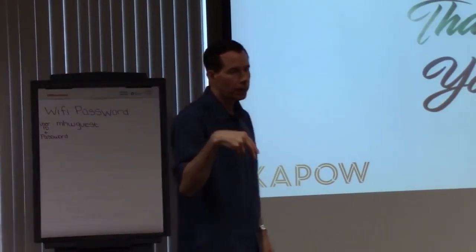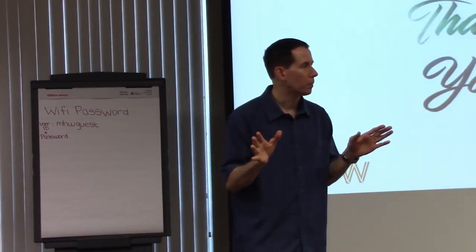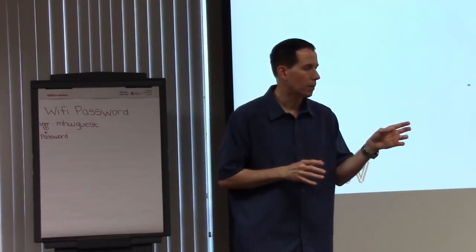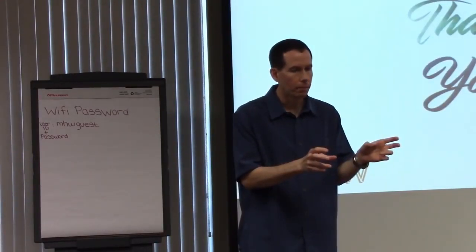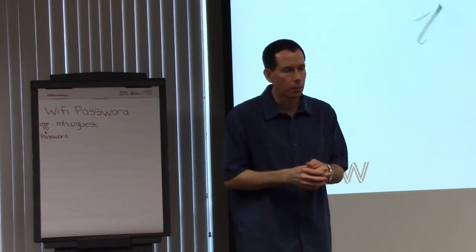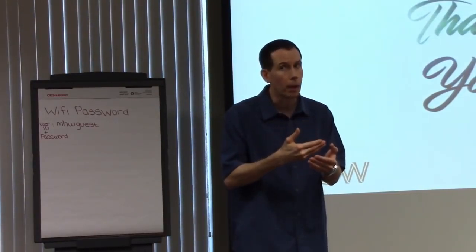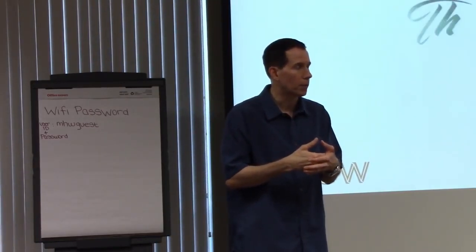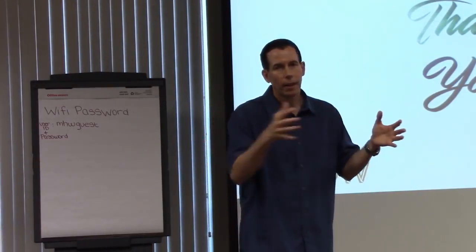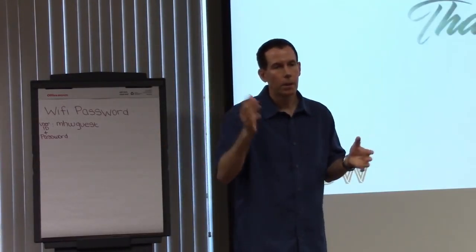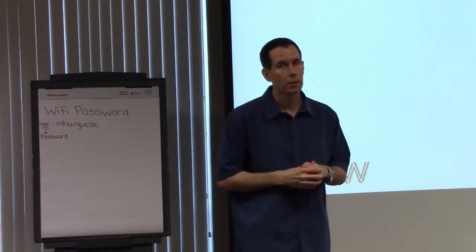I have people within the sprint do Kanban. If I have something, I'll split out into a couple sets of teams. Like we've got one area that's just for project, what we call project intake, and then another area was vendor portal. If that team on vendor portal wants to work as a Kanban, because you already know what the work is going to be and you're all confident in your time management as well as what's coming up and what's expected, then that's fine to work in there, but you're still working in the context of an end release date on things. The biggest issue I find with doing the Kanban really comes down to time management.